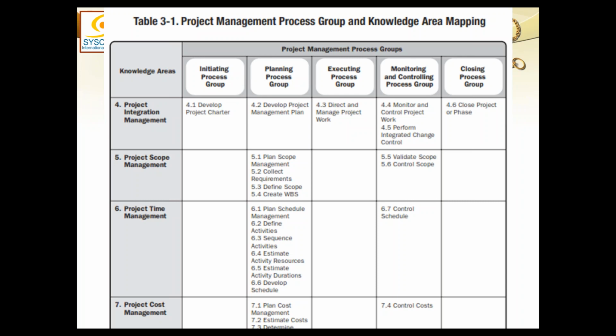Okay, sir. That means during planning of all knowledge areas, there will be some project documents created and populated there. But the final baselines and the basic management plans of each knowledge area will form part of the project management plan.